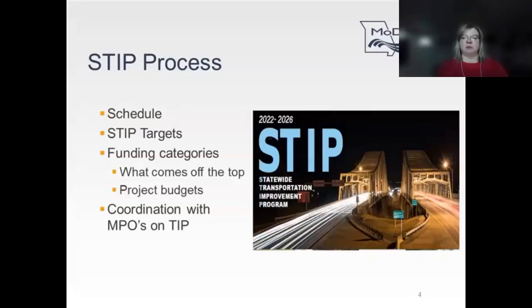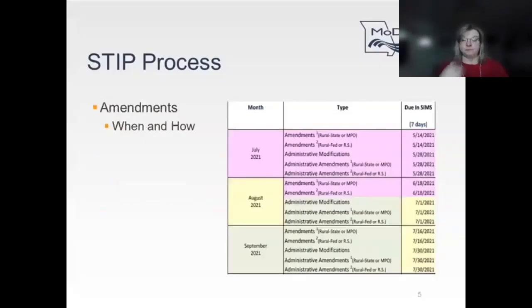At this point, when we begin allowing modifications to the STIP after the WNDOT approval, we start with August administrative amendments and administrative modifications. These are minor changes and consist of adding engineering-only projects or urgent projects, major or minor scope changes, project splits, adding right-of-way to an existing construction project, fiscal year changes, adding funding from others to projects, or technical corrections.